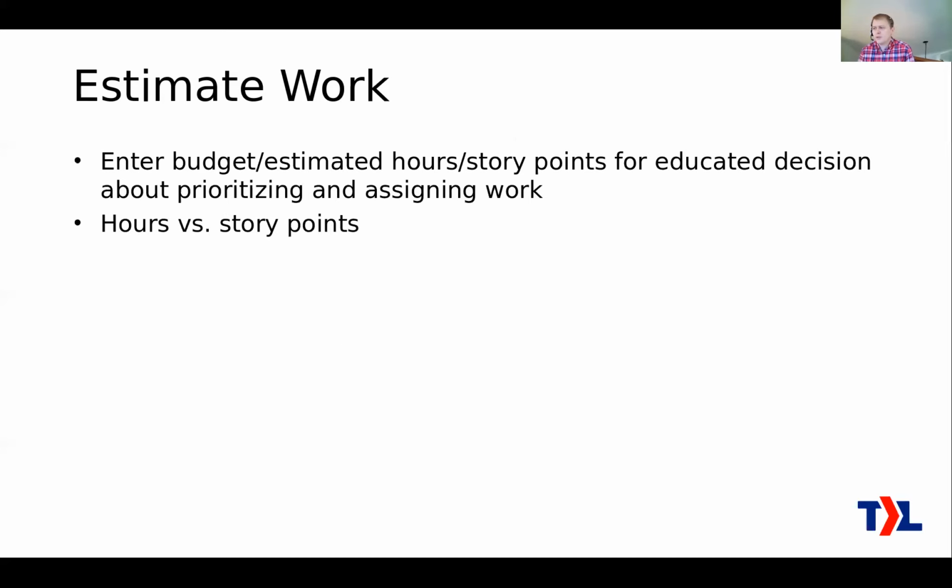A story point is a different way of measuring how big the ticket is. Instead of measuring the hours, you measure its complexity relative to the other work that you're doing. It comes out of Scrum methodology, so any book about Scrum is going to cover this stuff. A story point is just a number. There are a few different ways to do it, but usually it's a number like 1, 2, 3, 5, 8, 13. That's the Fibonacci sequence, which some people recommend.